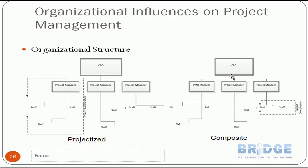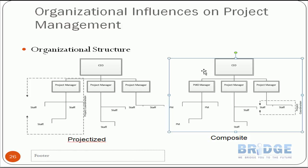The final structure is the composite or hybrid organizational structure. For example, an organization using a strong matrix with a PMO for internal projects may also want to give independence to specific projects — hiring dedicated project managers and staff on a temporary basis, with the project manager reporting directly to the CEO. This combination of structures is called composite or hybrid.